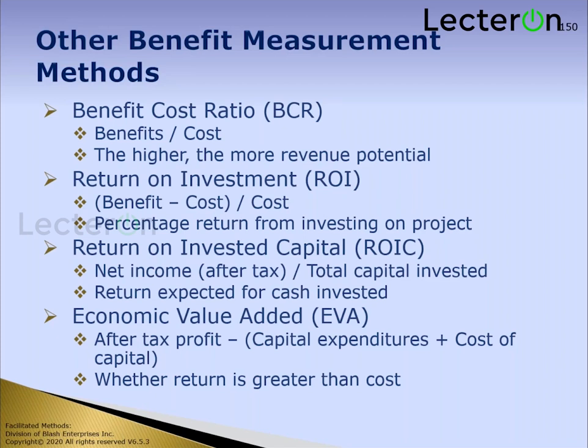Your ROI is that ratio, but instead of just being the pure benefits, they're taking out of it the cost, and it's the leftover benefits. And the ROI says, what am I going to get after I've taken my cost out compared to what it costs me to do? So that's where return on investment is the benefit minus the cost, or the net benefit, divided by the cost. Okay. Wouldn't worry about these two.